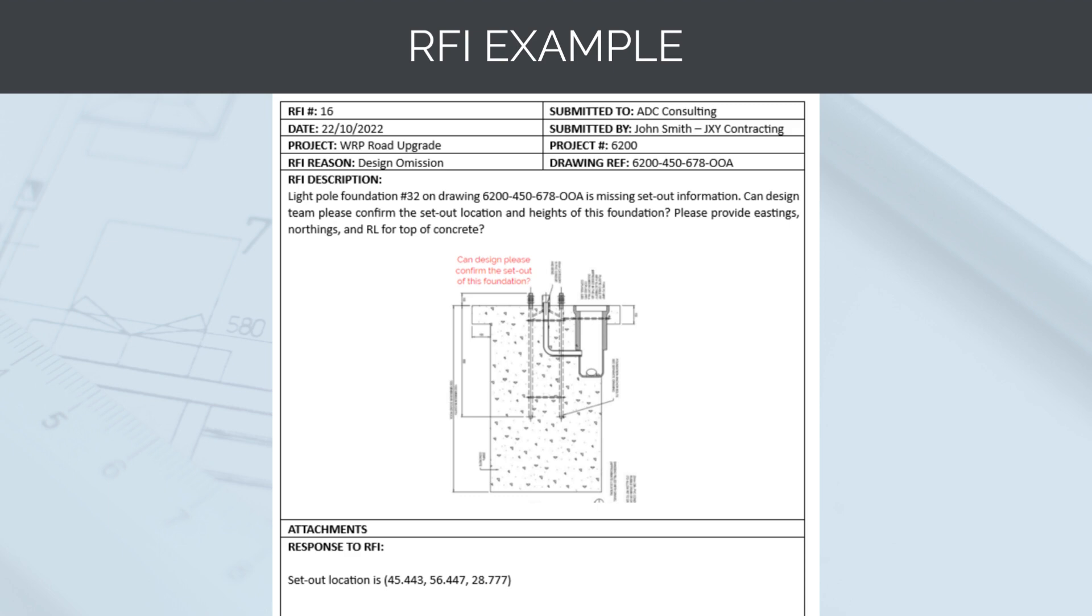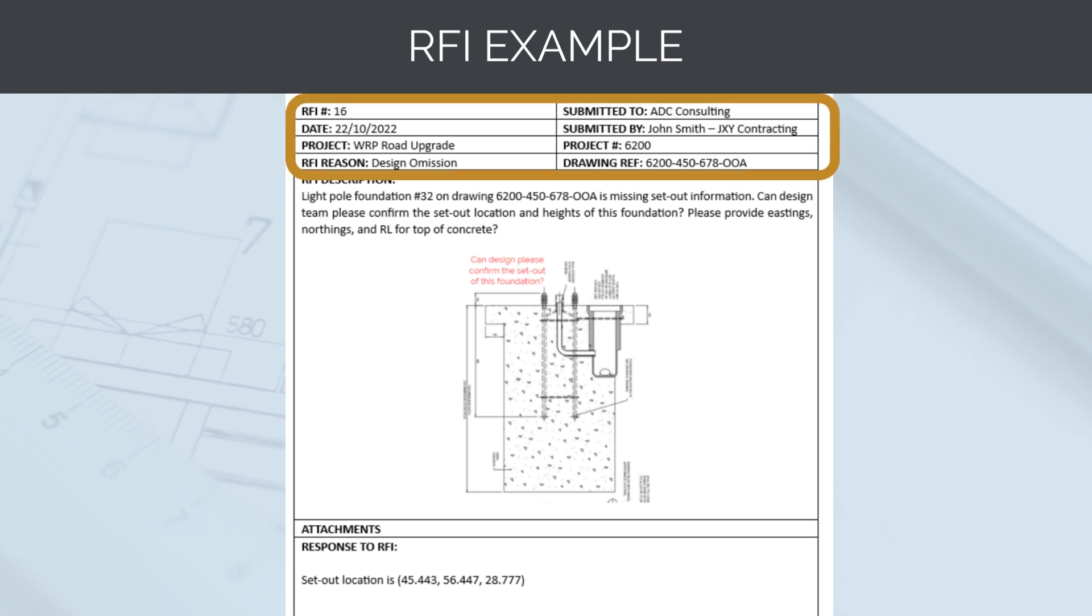Let's now look at an example RFI. This RFI is to cover missing set-out information for a new light pole foundation we need to install. At the top, we have all of the RFI background information. The RFI number is 16, which would come from the RFI register.